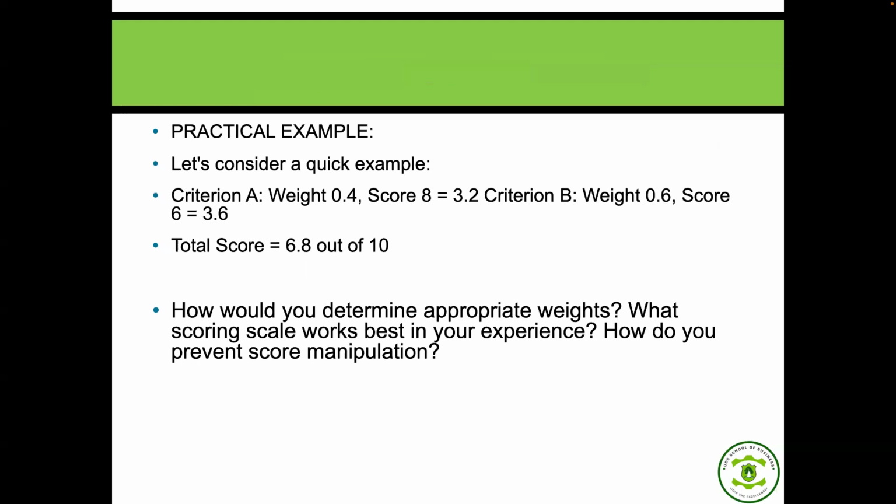So what we are saying is that when the scores are given, each item will have a weight. The weight would be the level of importance the project team attaches to either finance, technical feasibility, or risk. And then if everybody scores and multiplies and adds up, then we'll see.